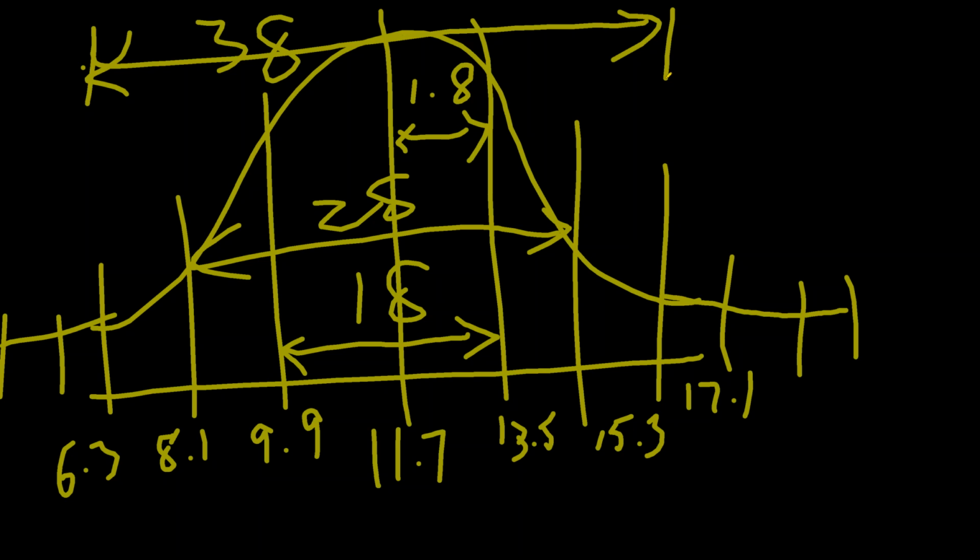You understand my point? And that different data would be coming from our 3-point estimate. Activity A was 1, 3, and 10. So I tell Monte Carlo to do a dry run. It randomly picks a value for activity A. It says, okay, 1. For B, out of the three values, it picks any one random value. For C, it picks any one random value. For D, it picks any one random value, and ultimately solves this network diagram and finds out that the duration could be, say, 10 days.